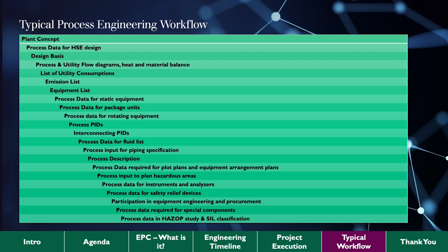If you are in North America, because the construction cost is pretty intensive, you are going to find that construction is the most intensive part of the whole process. In North America, almost 60% of the overall cost of the project can be concentrated in the construction phase. Meanwhile, you can find more than 50% of the project in the Middle East or Asia is concentrated in the engineering phase, because construction in those countries is relatively cheaper.